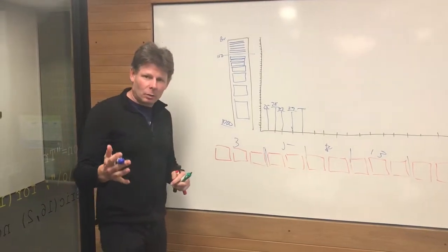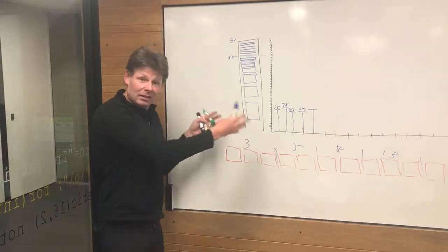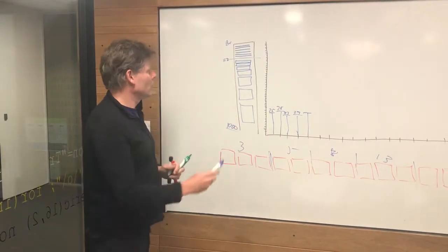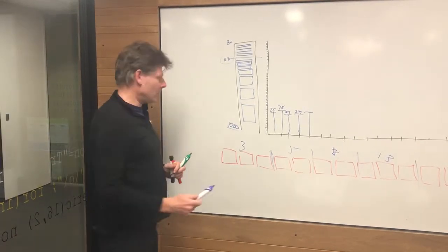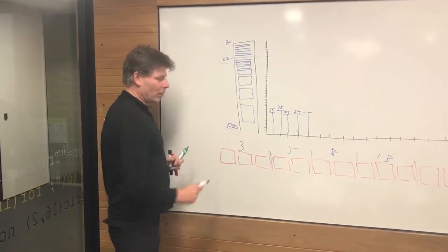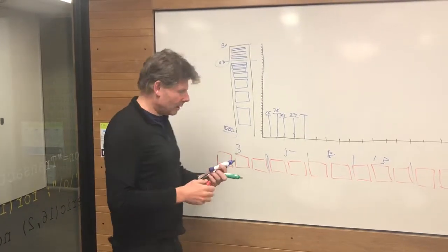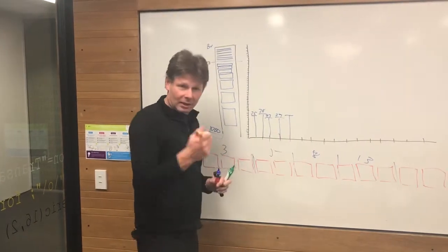There were quite a few senior executives and senior managers in this meeting. And this is the degree of fidelity that I gave them. There were no PowerPoints. But we explained that we'd done 150 story points so far as a relative size, and that the whole thing was 1,000 points. And you could see cogs whirring, because one of the managers, actually it was the CIO, was there, and he said,